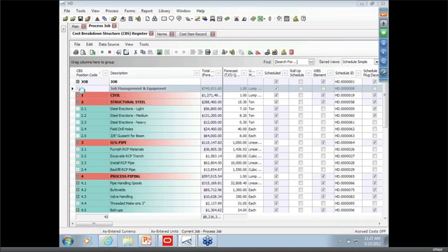So based on a duration of almost 540 days for that ad hoc schedule I put together, it's generating almost $750,000 in essentially job overhead costs associated with that project manager and operating engineer.